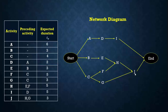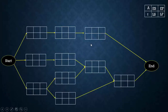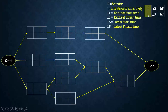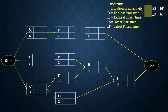Now we are going to see how to find the duration of the project using the network diagram. This is an exaggerated view of the network diagram where each individual activity is represented by a small tabular column showing the activity name, duration, earliest start time, earliest finish time, latest start time, and latest finish time. We will now fill in all activity names and durations, then carry out the forward pass to find the earliest start and earliest finish time of each activity.